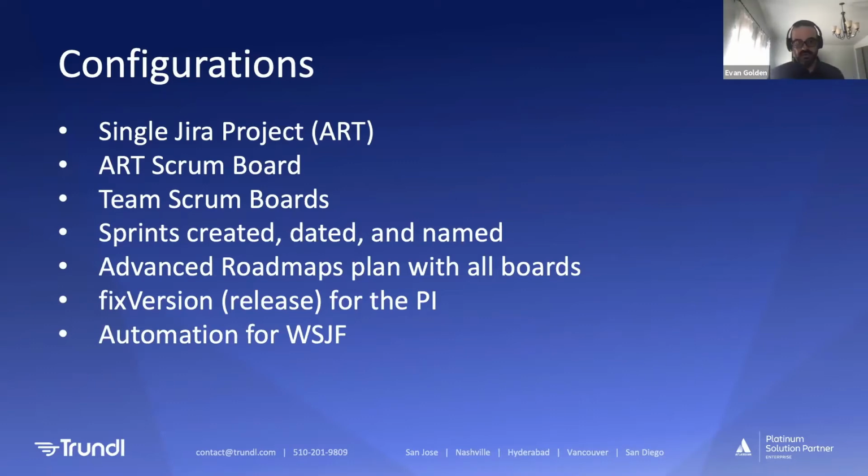For PIs, I use fixed version. So the fixed version release field is nice. It gives us a time box, and it also allows us the opportunity to show milestone dates on the roadmap.